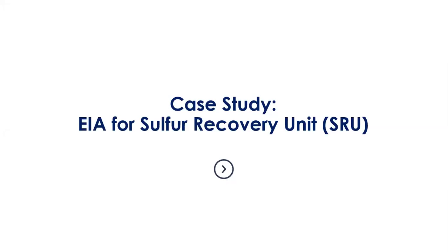Do we need to continue to review and update EIA? If yes, what is the frequency? Yes, definitely. We need to update the EIA as well. In our initial slides, we mentioned that every 5 years, on the basis of the HSE integrity audit, we have to update the environmental impact assessment. Even for an existing facility, on the basis of the HSE audit, we have to carry out or update the environmental impact assessment after every 5 years minimum.